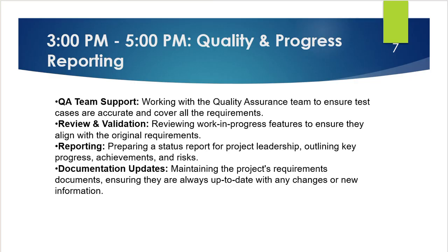So I'll prepare a detailed report of the project status, and that report I need to send to the project leader, outlining key progress, achievements and the risks we are currently going to face in the system. If there are tasks which we are not able to complete within the time, I'll mention why we are not able to complete them and the progress of those tasks. So all these things I'll do in the reporting part.